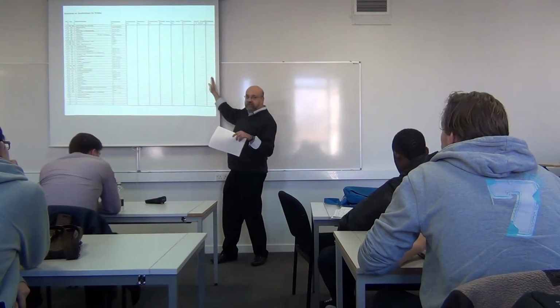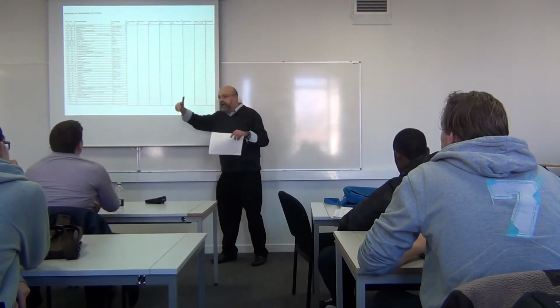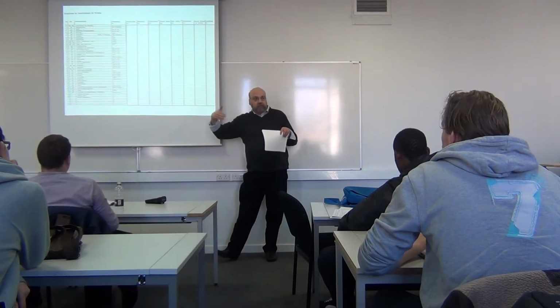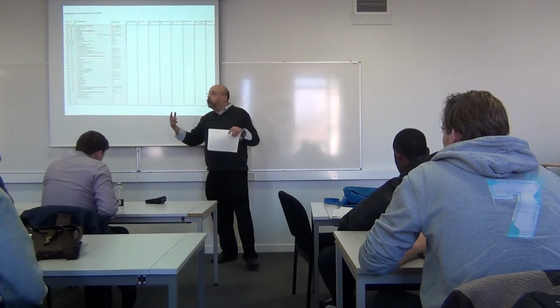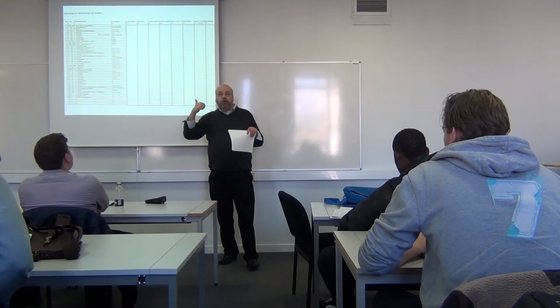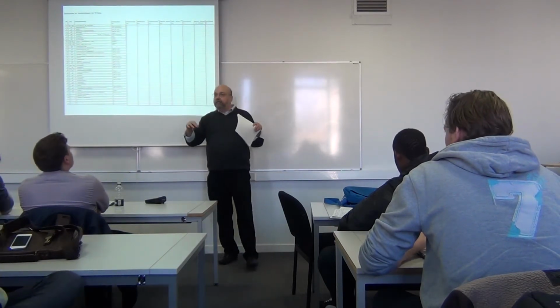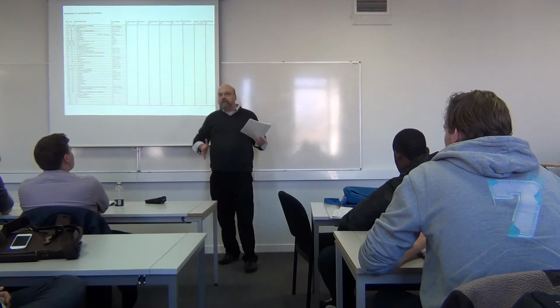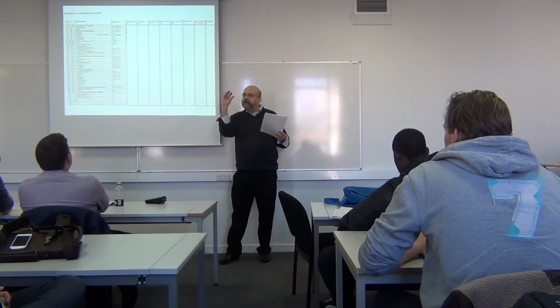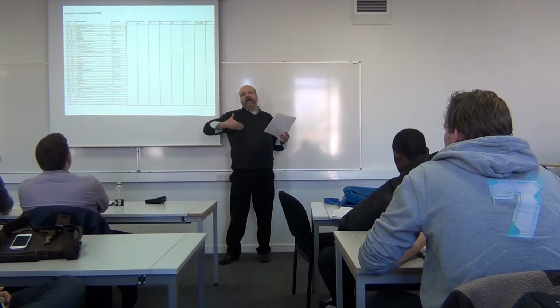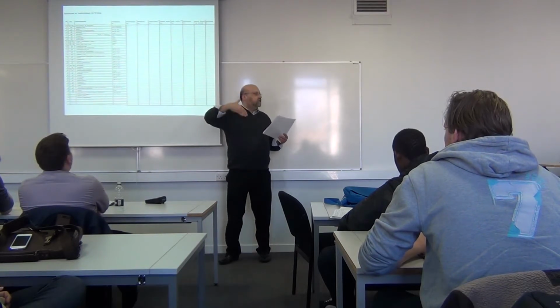Because when I count from the back, so to say, when is the implementation? What is the pre-time before the implementation? Maybe I need pre-time to order my tiles, to order my materials, to order my handrails, to order my banisters or whatever, my window profiles, my parts. I need a certain pre-time.